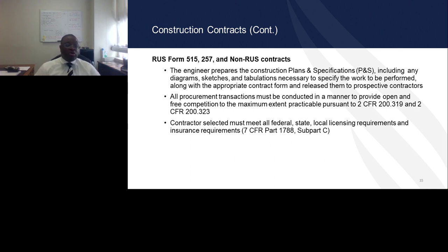All procurement transactions should be conducted in a manner that provides open and free competition pursuant to procurement requirements in 2 CFR 200.